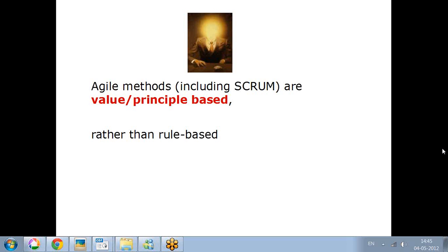Okay, so velocity is something which we will not be discussing today, because if I have to explain velocity, I'll have to talk about user stories, sprint planning meetings, playing poker. That will take some time, so that is outside our agenda today. Velocity cannot be used for other organizational activities, because velocity is valid only within the project. It cannot be used even to compare two projects.